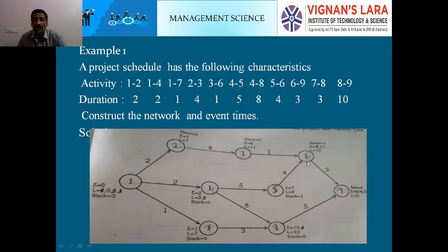Whenever there is more than one path to reach the sixth event, if you want to reach the sixth event, you go first this way. Add this 6 to 7. Here put 7. Another path is there to reach event 6, like this. This is 11. Under forward passing method, only the highest characteristics are taken into consideration. Lowest characteristics are cancelled. It will be like this.